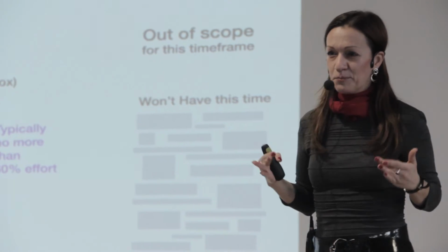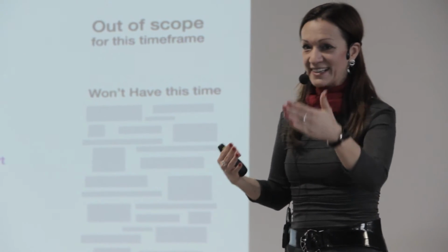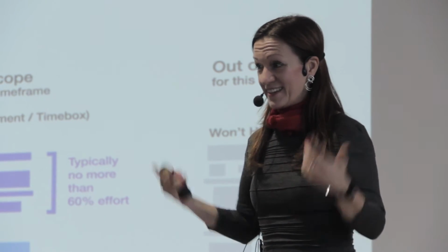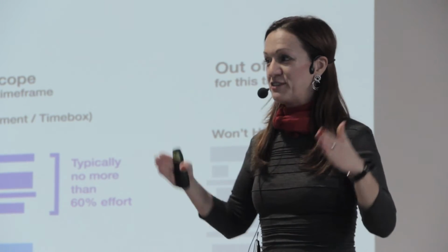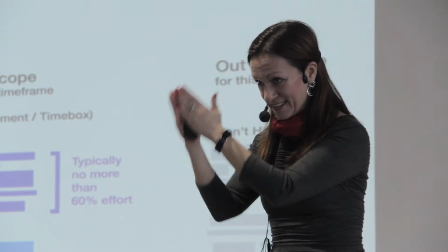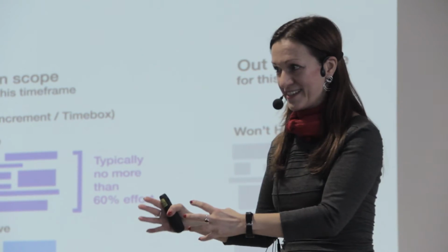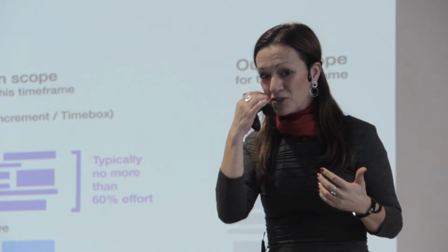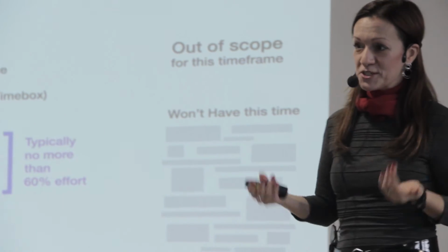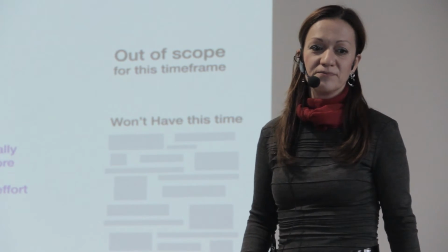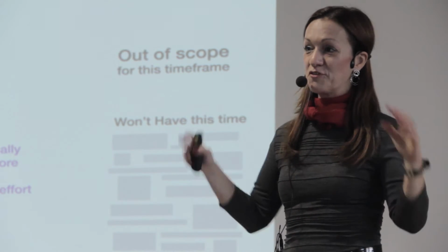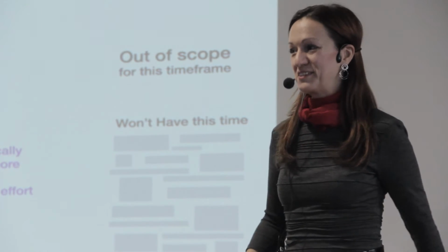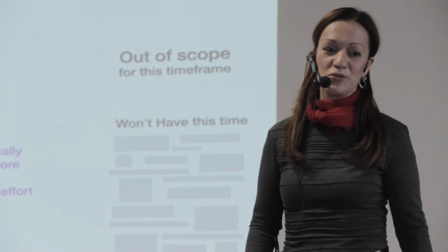So it is very important that the business analyst makes it clear to the customer that in a changing world like today, it is not possible to achieve everything 100% with a defined time and with a defined cost, because things are changing. The requirements are also changing, yeah? So one possibility to handle it is to define a certain percentage of must-have requirements, and these are the survival ones, the ones that we need to succeed with the project.